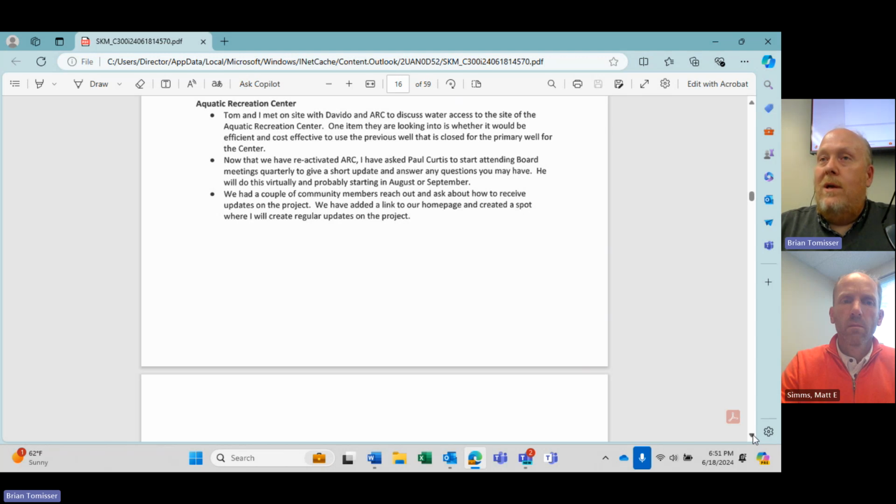As Matt mentioned earlier, with the pool committee getting back to work and going through this detailed list of items that still need to be vetted, we did get today an estimated cost of all the items we're vetting. Again, these are estimated costs. We're really not going to know the full cost until we open the bids, but these are educated guesses that we're anticipating. As we get into the transition points of going into CD, and the JACC's work with the DD coming to an end over the next couple months,